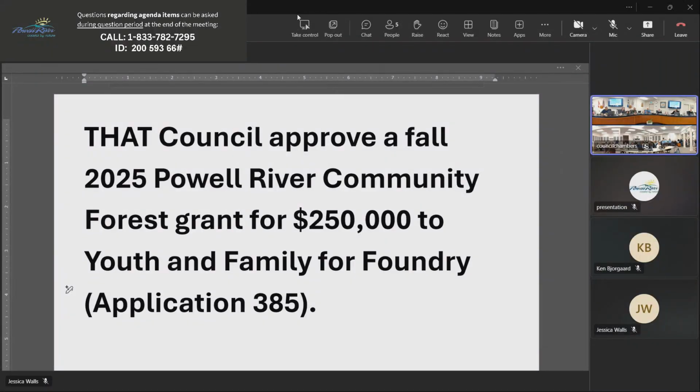The second important point is to understand what is the cost associated with developing Foundry as laid out by Foundry to community forests and to the public. Foundry hired a Kelowna firm to give them a Class 4 estimate on the cost of renovating the facility so it could be used for Foundry. That estimate was over $6.6 million without tax consideration. Anybody who knows anything about Class 4 estimates knows that at best, they come in 20 or 30% higher and often can come in 100% higher.